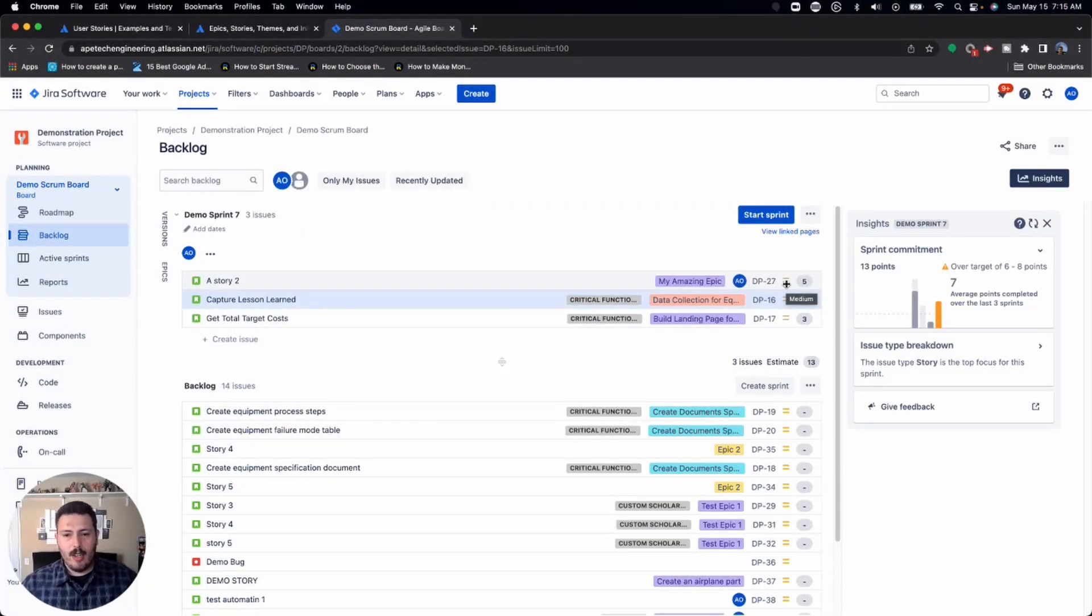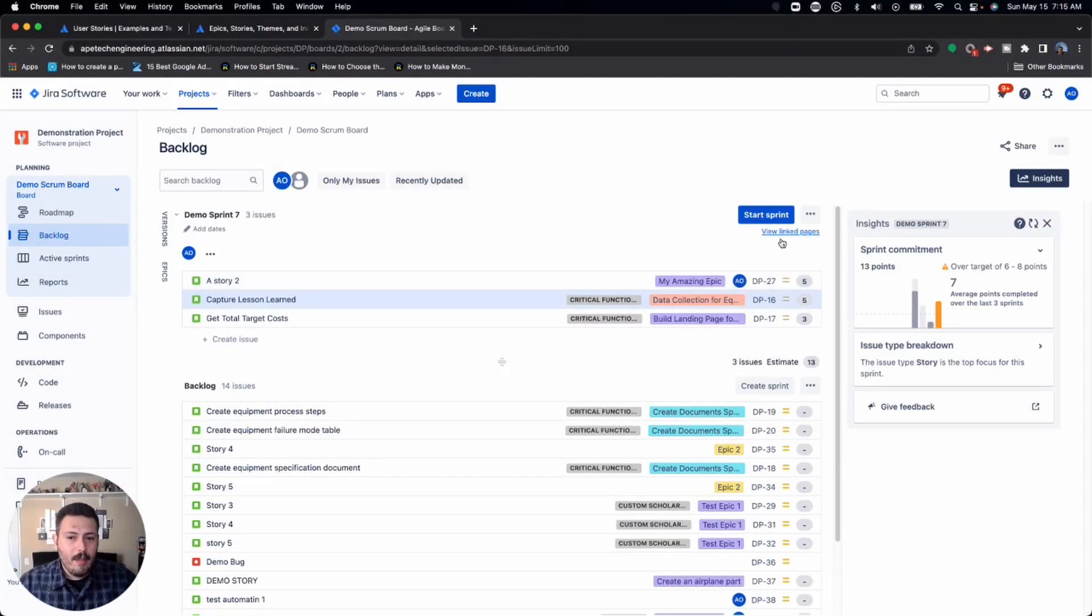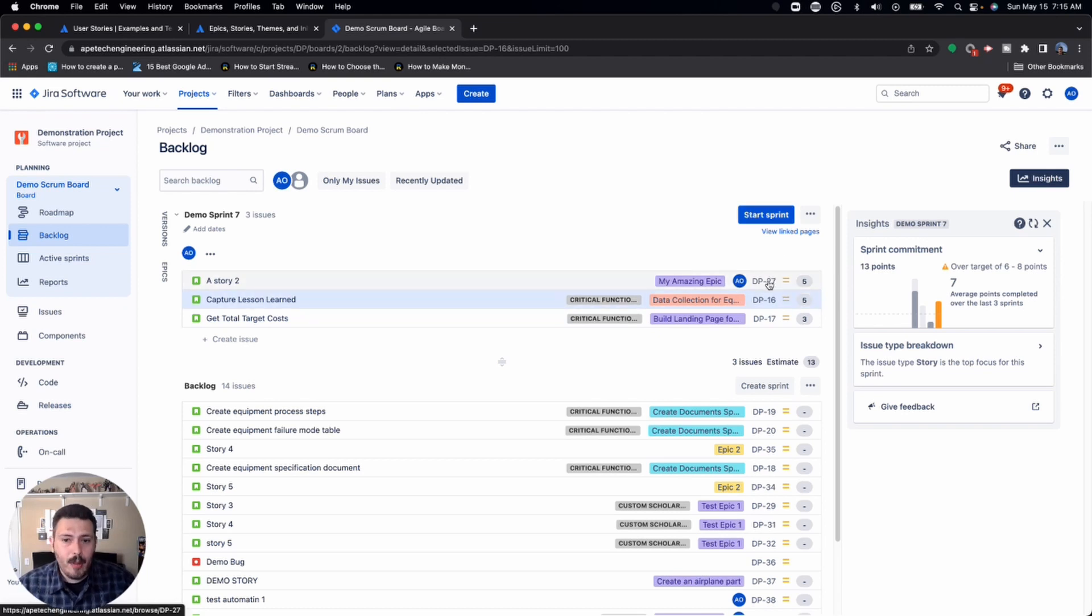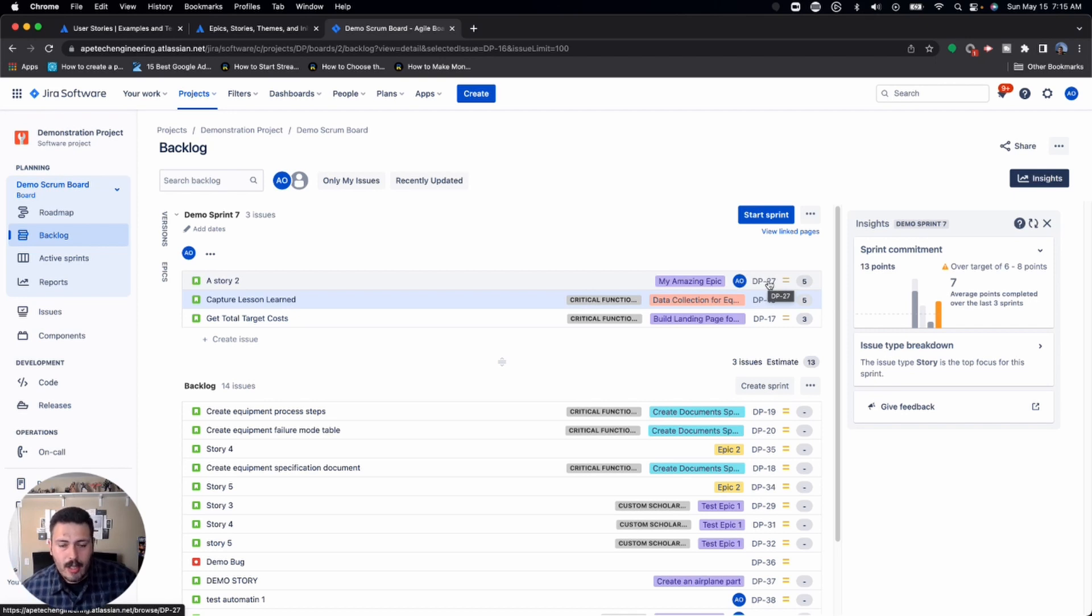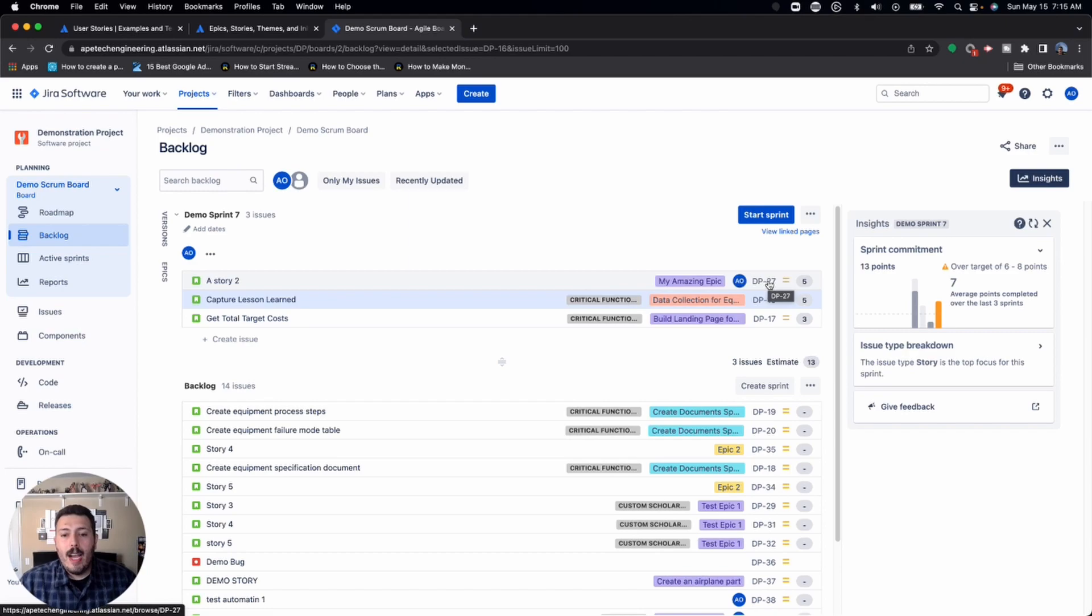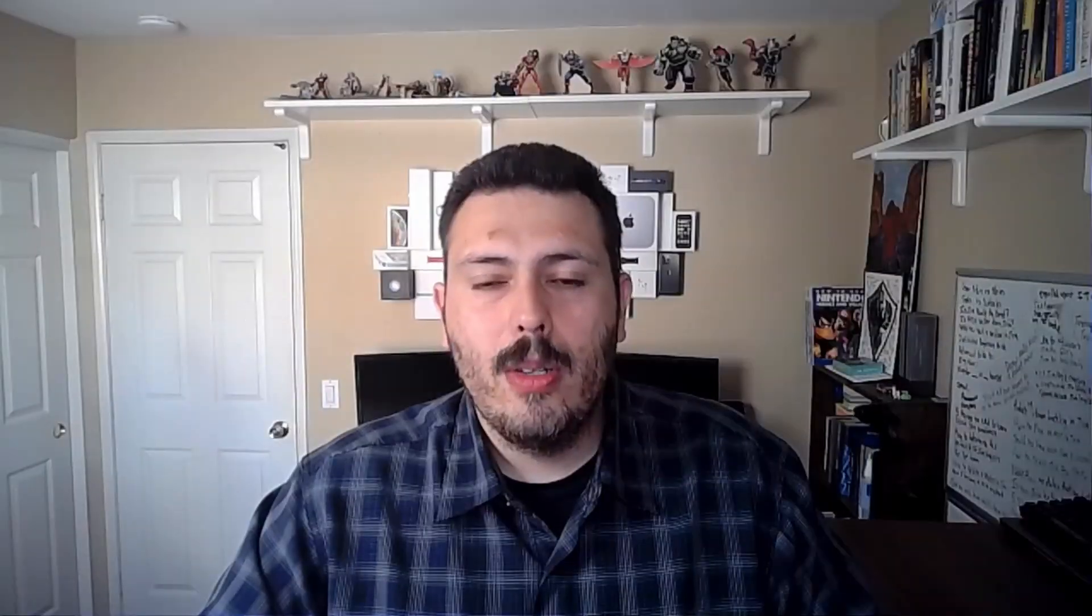Anyways, that's going to do it for this video. Hope you found some value here. Make sure the number one golden rule, if there's a key takeaway out of this video that I want you to ingrain into your mind, is never, ever, ever start a sprint without making sure that you have all the values in here. If you hit the start sprint and some of these issues don't have points, you're going to have a really messed up burned down chart. It's just going to alter your metrics really poorly. And so as a best practice, make sure you always have the story points and if possible, all the assignees already given to people before you hit that start sprint button.